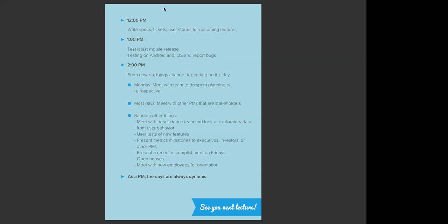So anything that's a 1, that is a priority, you add to the sprint. You size it, give the numbers, and that gives you the total number of user stories you can take in. Engineers will go through and say, you know what, this is an 8 because it needs to be broken down further into its components.